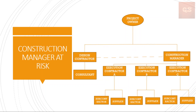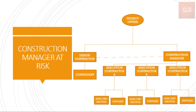The last arrangement is called the Construction at Risk arrangement, also called the Construction Management at Risk model. Here, the owner maintains a direct relationship with the design professional and a separate relationship with the construction manager. In this manner, the owner provides for multiple prime contracting to speed up the project delivery cycle while shedding some potential liability with respect to the multiple primes. The construction manager holds all the trade contracts and the liability for the same in this arrangement.